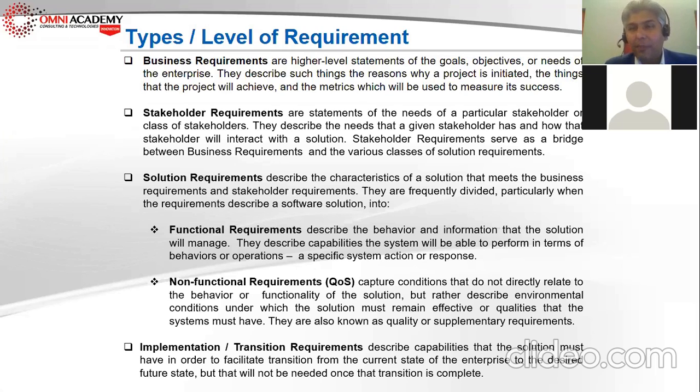Can you imagine the hassle of that transition requirement? It was too huge, because there were 2,000 plus computers, and you needed to upgrade the operating system on all of them. Think about the licensing cost, and forget about licensing cost. At that time, the operating system could work on one computer and not on another. There was a minimum RAM requirement and a lot of this stuff.